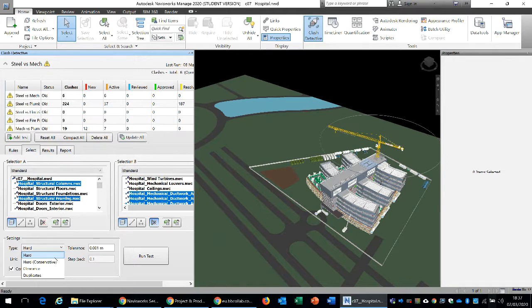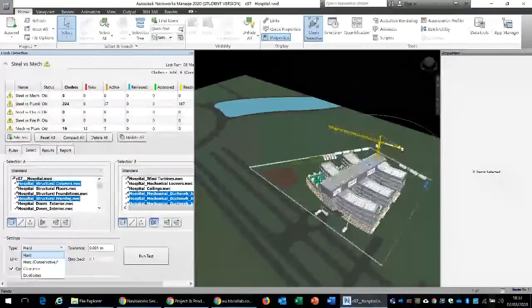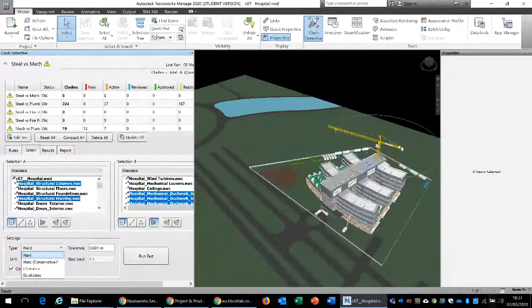Now, if you discover this clash at a later stage, that could potentially cause the work to be stopped and create a disturbance. It could possibly be a critical task, resulting in a knock-on effect on your project. So the whole idea is think before you act, and identify the potential clashes, so that once we go on site, we have run the simulation and we know that we have got maybe a millimeter level accuracy, and there are no issues.